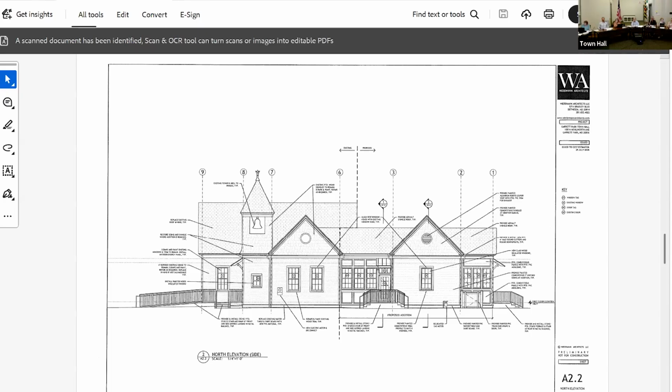We're expecting to see the estimate at the end of August, and then presenting it to you at the September meeting, which I guess is the 9th or the 8th of September. Originally we were going to wait until the estimate, but this is an opportunity. It was first introduced to us by the civil engineer, who wanted to get a lot of the site things started, since they tend to drive the schedule. So that's why you approved that work previously.